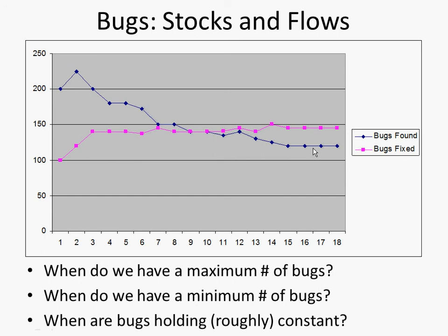So what you're going to see from this is a situation, something like a rising curve, plateaus in the middle, and then a dropping curve for the total number of bugs. This is time on the x-axis, and on the y-axis is the total number of STIs or defects, in other words. Okay? Total number of defects. It rises, plateaus, and declines.